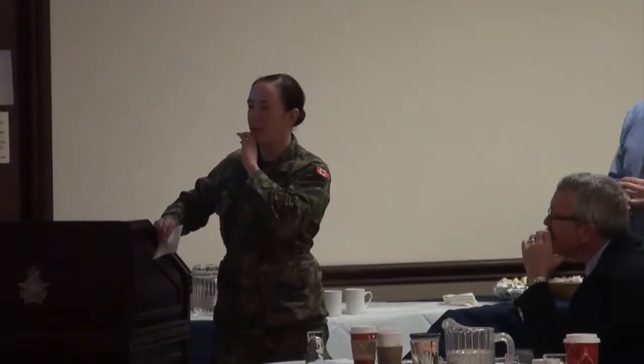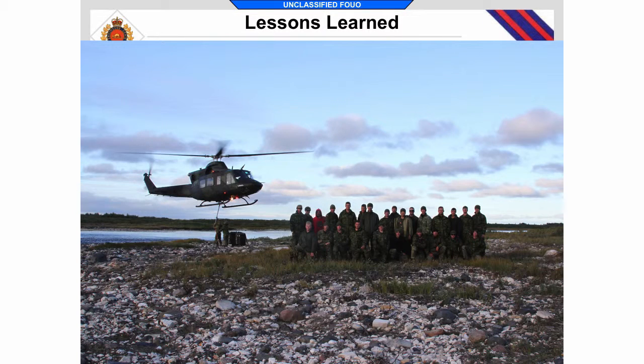And just, again, next slide there. Most of these I've already hit on, so I won't cover them again, but in terms of lessons learned, we really drew a lot out of this. Big one, early joint planning with all those supporting elements that need to come together. The second huge learning point for us was that air movement planning piece. Again, totally outside our comfort zone. We found that even within our unit, we didn't have a lot of those key assets that we needed to help us plan this, little stuff like dangerous goods cargo.